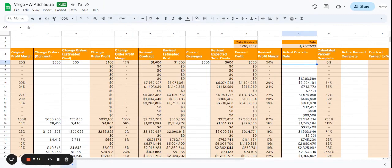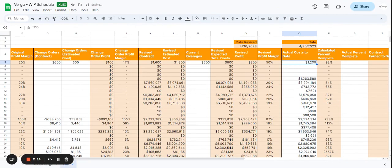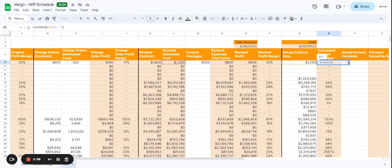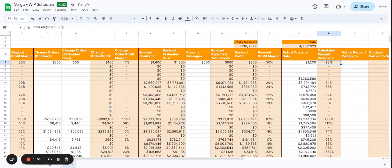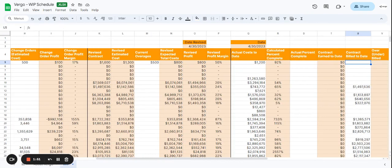And let's say the actual cost for this, just to give you a round number, let's say it was $1,200. So we have calculated percentage complete, 92% based on the actual cost to date, divided by the revised estimated cost. So if we've already spent $1,200 and the revised estimated cost will be $1,300, then we've already completed about 92% of the project.